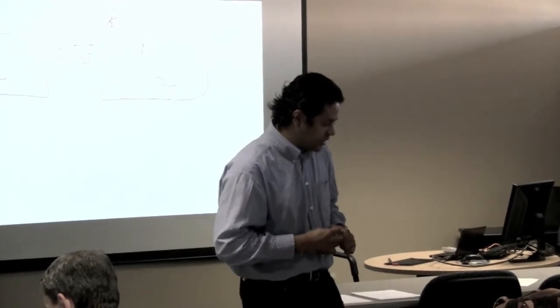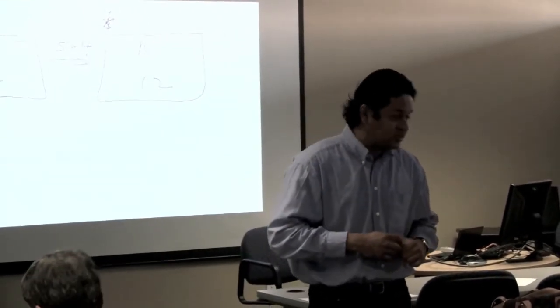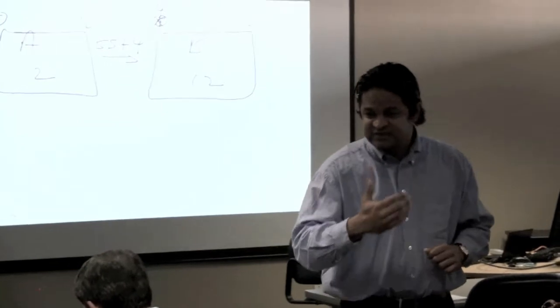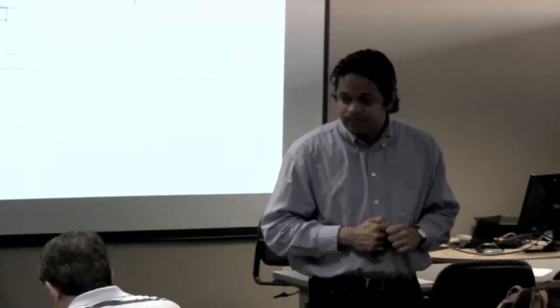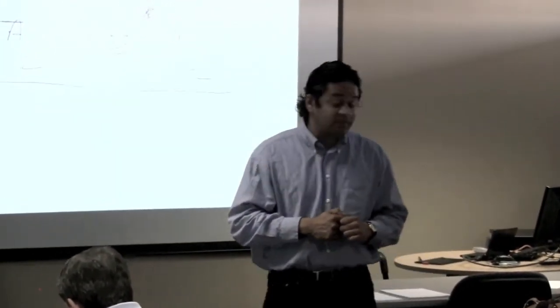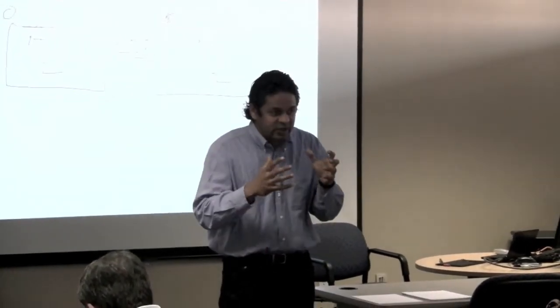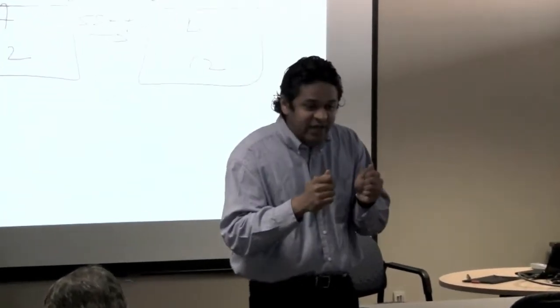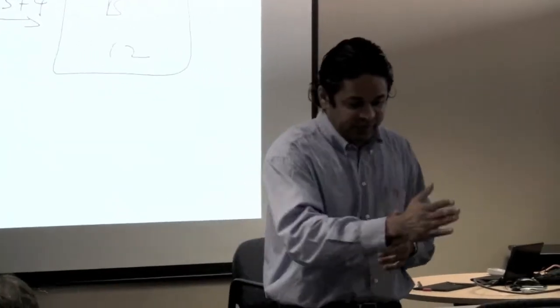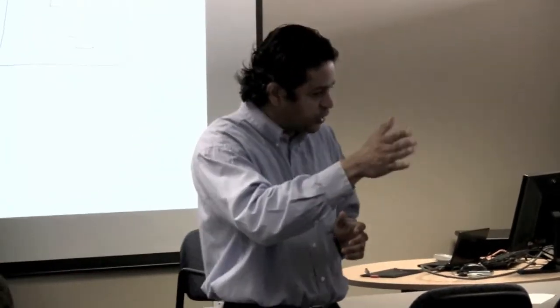Just above that on page 13, it talks about progressive elaboration. It's clarifying the plan as data becomes available. At the start of every project, there are many things that you just will not know. But that doesn't mean you stand there and you freeze up. You plan as best you can, and as data reveals itself, you further clarify a plan. When an airplane flies, 90% of the time it's off course, but during its flight, it makes several small corrections, and eventually it homes in on its final destination.